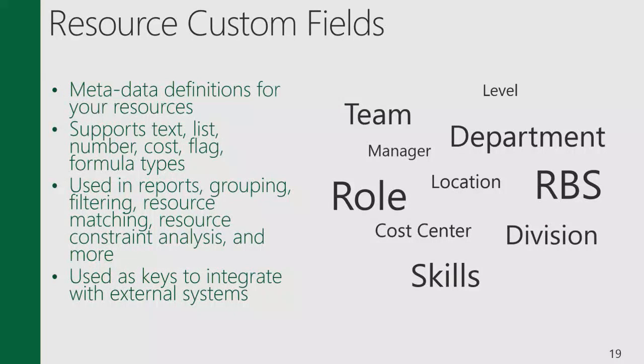Another core concept, I should say, it's more of a core concept of Project Online and Project Server in general. You obviously have custom fields for projects and tasks, but in the context of resource management, resource custom fields in this case are very important in many ways. This is what will help you map people with generic resources. Usually you pick a specific resource custom field that would make that match possible, usually based on roles, but you can pick the RBS, for instance. So anybody on a specific RBS node or on a specific role node would map to a single generic resource.